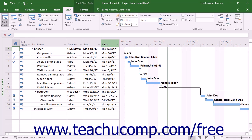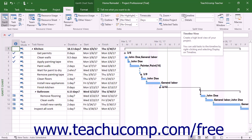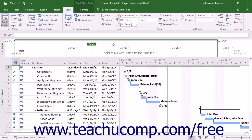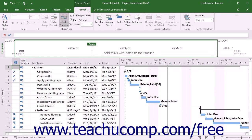To add tasks to the timeline view, ensure you can see the timeline in the project file. To show the timeline at the top of the Gantt chart view, check the Timeline checkbox that appears in the Split View button group on the View tab of the ribbon when viewing the Gantt chart view of the project file. Then click into the Timeline view to show the Format tab of the Timeline tool's contextual tab in the ribbon.